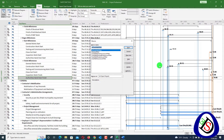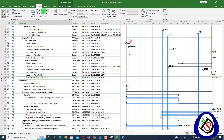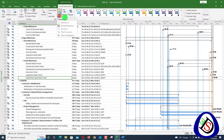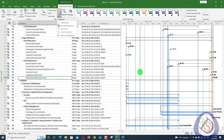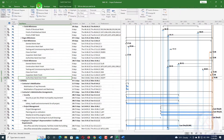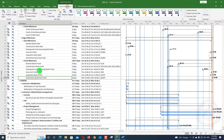Here is the condition for using this macro: you must first select an activity and apply the Task Path filter on it, and then you can run this macro. I have selected an activity, then gone to Gantt Chart Format > Task Path. You must first select the activity, then highlight 'Driving Predecessor' — only one driving predecessor. Then go to View > Macros and select the activity you want to filter.